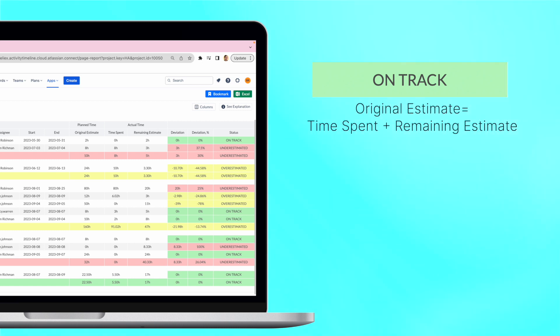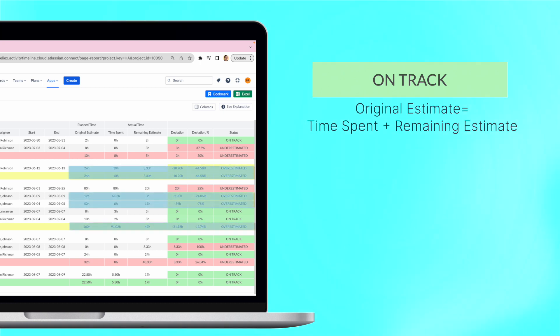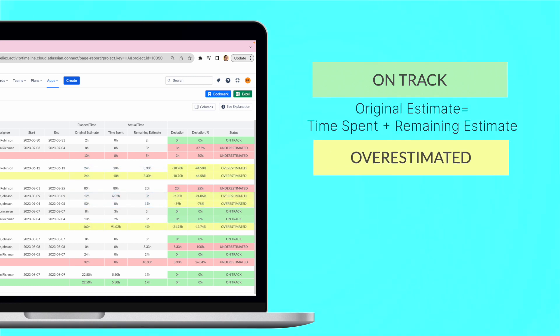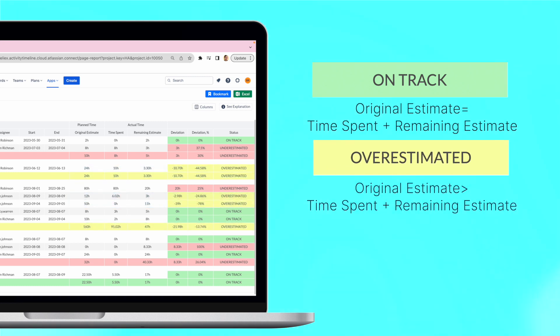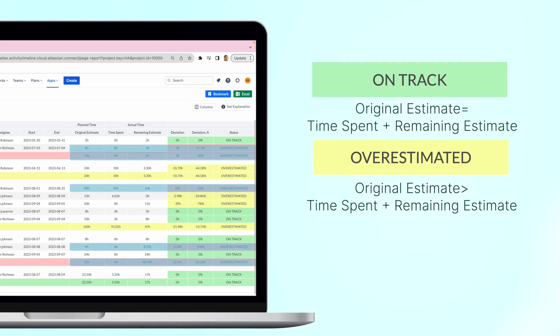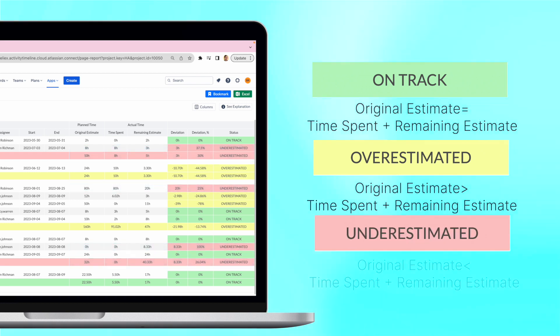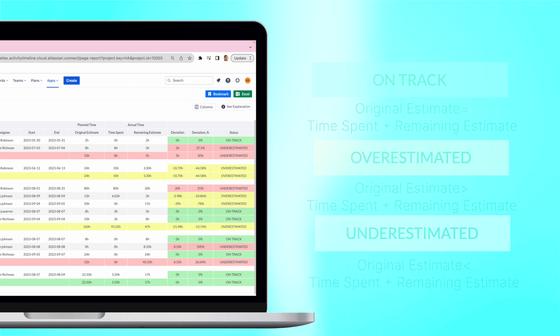Of course, we don't live in a perfect world, so it's rarely the case. If the original estimate is bigger than the time spent and time remaining, it shows that the task was overestimated and less time is needed than initially expected. And if the original estimate is smaller than the actual, the task was underestimated and took more time to complete it.